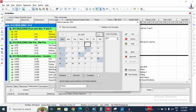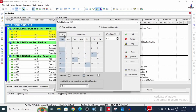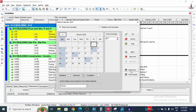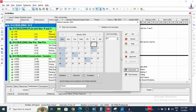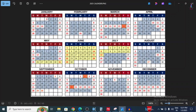We will add some more holidays. First, we will add Sunday as a non-working day. Go to the Work Week option. I'm setting standard working hours to 9 hours per day, and Saturday will also be a working day. Click OK. Now we need to add the specific holidays, marking all selected days except Sundays as working initially.